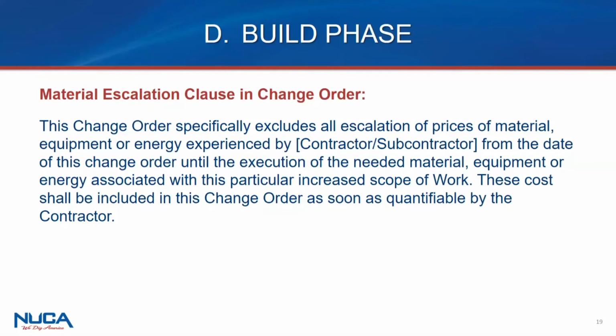Now, as you can imagine, and as Tom would guess if I asked him, no one signed that change order. They like the notice provisions. They know that they protect the owner, and no one's waiving that. And the idea that he was being litigious when he followed their notice provision was just a means of what I would say is bullying the general contractor into not following his own contract. So we have a gotcha moment at the end, and then you're just really relying upon the equity and good graces of the owner to give you a change, as opposed to you followed your contract. So think about that in this context.